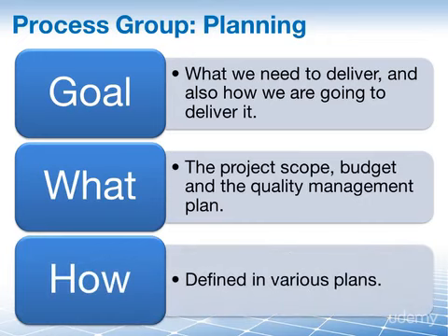For instance, the staffing management plan will tell you the processes that you will perform in order to put a team of specialists together that can deliver the what. It might say that we will primarily try to assign internal resources, and then we will look for appropriate consultants, and we will also need to employ 3 new engineers for project-specific research and design.